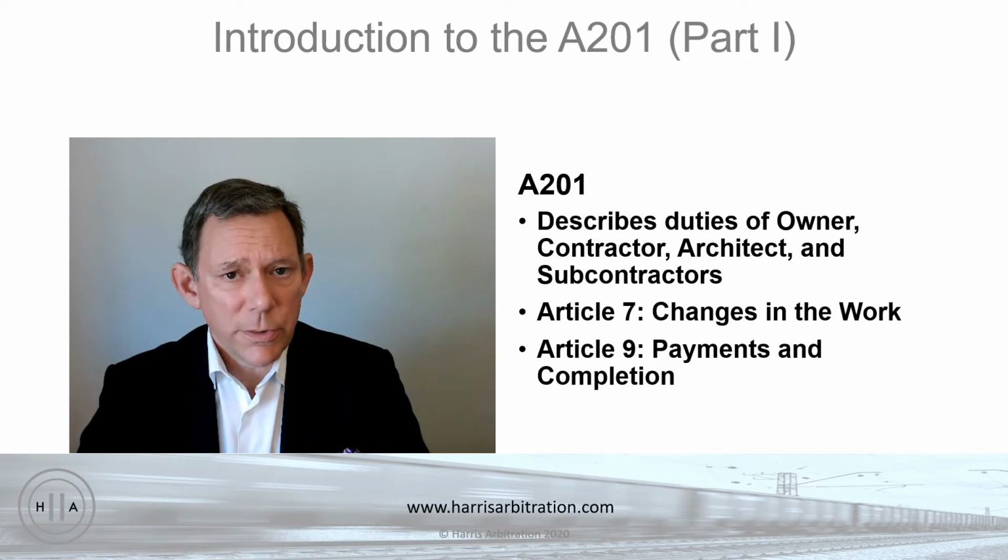Now, while it's true that the A201 is one of the contract documents, part of the contract between the owner and the contractor, it will also be incorporated by reference into the agreement between the owner and the architect and between the contractor and its subcontractors.